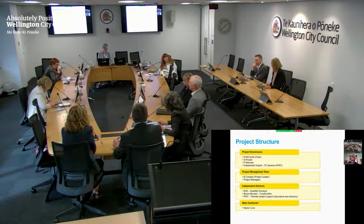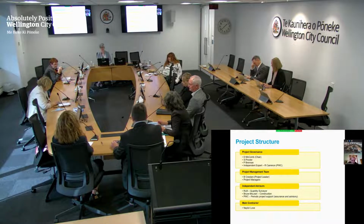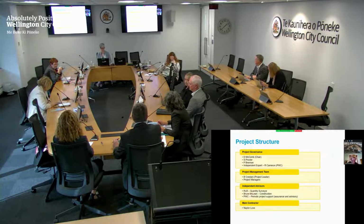We also have an independent engineer to contract, Bruce McLean. He's not with us today, but Bruce is really responsible for ensuring that any variation in claims that the contractor puts in are verifiable and should be paid, etc. So we've got a very strong project governance and project management team across this project, and have done since 2019.